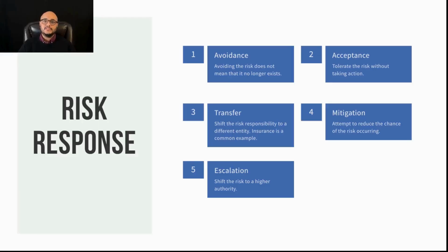I take insurance out on my car. If I get into an accident, the cost of that car, that risk, gets transferred to the insurance company. The insurance company pays for fixing the damaged car. I'm transferring that risk. Companies take out insurance all the time on projects. They're transferring that risk to insurance.